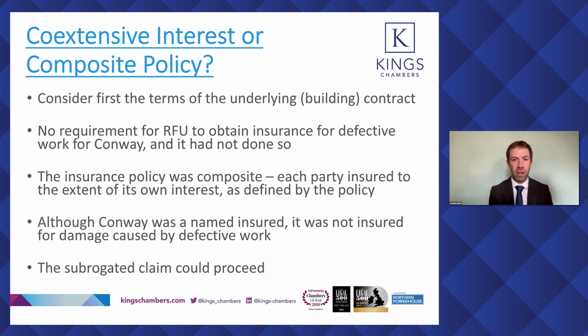the same policy does not by itself mean that A and B are covered for the same loss or cannot make claims against one another, and cited the Haberdasher's decision for that proposition. There's a good summary of all of these principles at paragraph 53 of the Court of Appeal's judgment, and applying the principles that we've looked at to the facts of the case, Lord Justice Coulson held that although the policy did on its face cover defective work or damage resulting from defective work, it was actually a composite policy rather than a joint policy in the strict sense. And the parties, namely RFU as employer and Conway as contractor, had different interests.